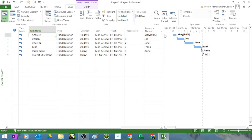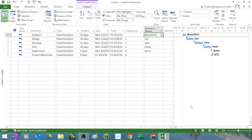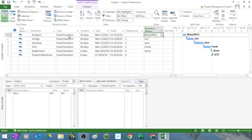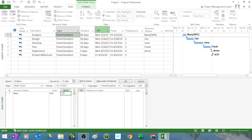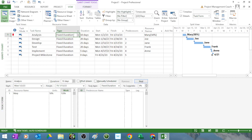So even if, take a look, even if I add more time to this task. Let's right click show split. Even if I add more work to this task. Let's say I'm like okay Mary's gonna work 80 hours. Or let's say 120 hours. Take a look at the duration. I say okay. The duration doesn't move. But Mary's over allocated. But the duration doesn't move.